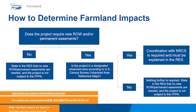Projects located inside designated urban areas, according to the U.S. Census Bureau maps, are not required to consider farmland impacts. Projects outside designated urban areas that also require new right-of-way or permanent easements must consider farmland impacts, even if the area affected is not currently farmed. Farmland impacts are based on soil types and not current land use. Coordination with the U.S. Department of Agriculture NRCS Area Resource Soil Scientist is required when right-of-way or permanent easements are acquired outside designated urban areas.